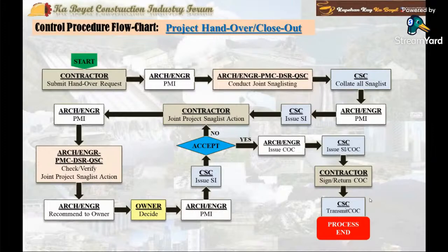And this ends the handover closeout control process. At this point, the contractor may proceed to request the release of payment of retention.